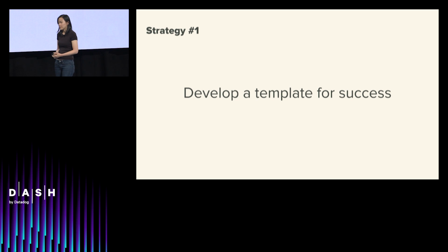And so for us, as we started the second SOA attempt, what we realized was we couldn't just pick any endpoint in the product flow. We needed an endpoint that was both critical to the business and of reasonable complexity that would really prove that SOA could work for any flow in the site. And so we decided to pick the listing detail page.